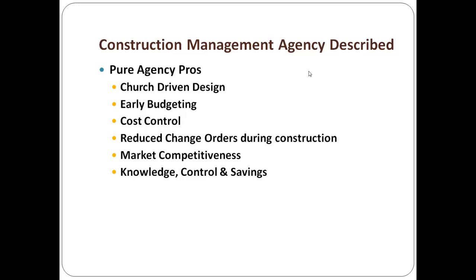So you can understand the track record that I have seen by one national church builder that was a construction manager that used pure agency. In 20 years of building churches, if my memory serves me correct, their record showed that they had only gone over the low bids that were collected as they took all the bids from the subcontractors, plus their markup, the cost of the fees charged by the construction manager. They'd only exceeded that three times.